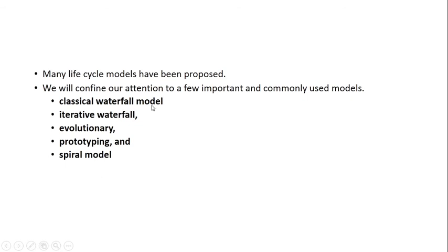Because the answer to this question is each and every model has a particular application area. We use the waterfall model when the requirements are initially well known. If you don't have all the requirements in hand, we can never use the waterfall model, it will fail. Right? The prototyping model is used where we have developed the software.